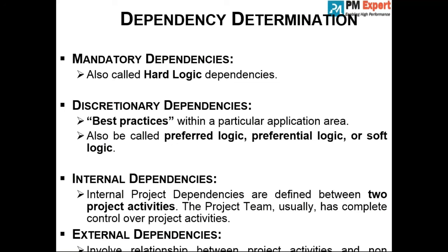So yeah, they didn't have any control on the engine. They have to procure it directly. They have to procure a readily available engine from Fiat. So this is an example of external dependencies. Generally, external dependencies are a source of risk in a project. Does it make sense or not?